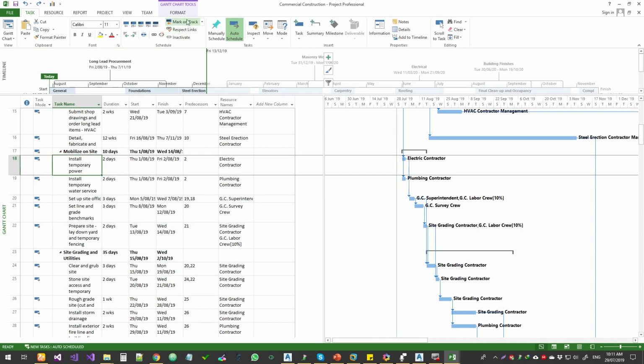All right, next one is mark on track. Whatever you say should be completed on the 3rd of 9th, if you mark on track, anything that is supposed to be completed for today will be marked as completed. That means we are checking every task and marking it as complete. Then respect links, we'll see as we go through. Some of these things I need to go through as an exercise.